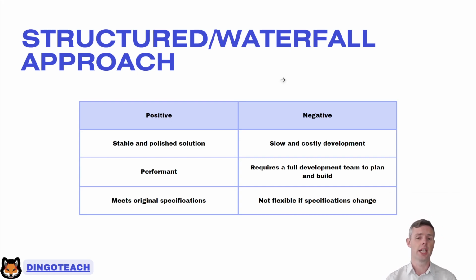Now the issues, it is obviously slow, okay? Because you got to go through those stages and there's often only a couple of people working on the specifications and the designs, you're sort of stuck. Until those people are done, you can't move forward with your project. The developers are sitting around scratching their heads or working on older projects or maybe training themselves while that new bit of software is being planned. The other thing is it's not as flexible.